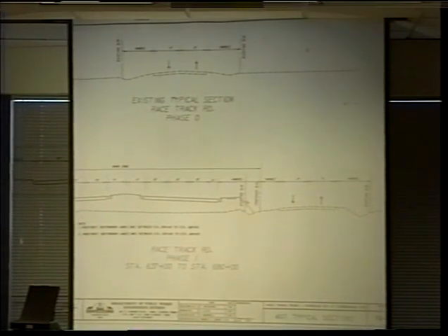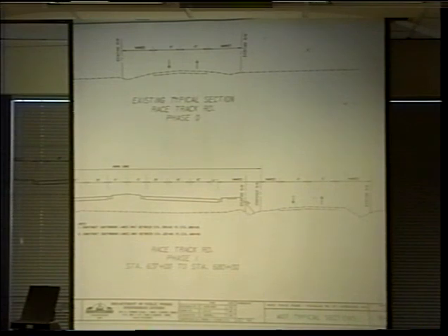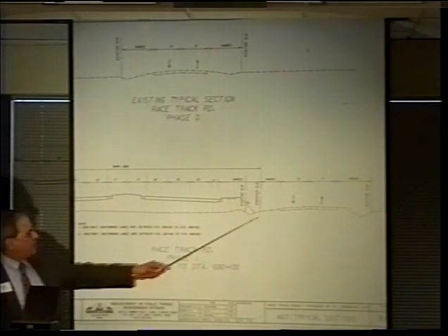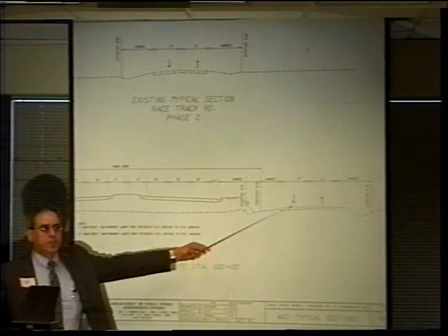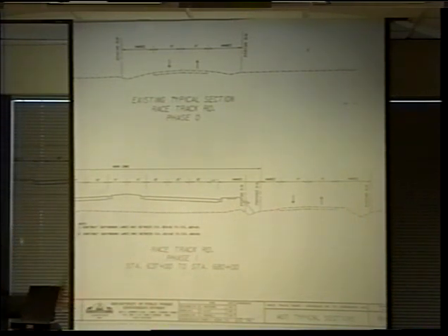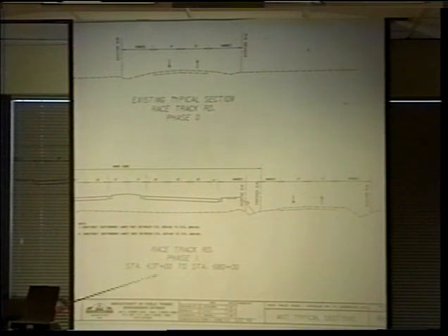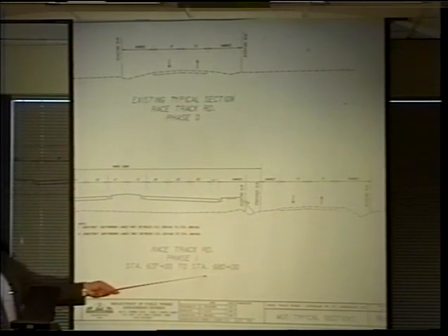Finally, another condition here where the MOT, maintenance of traffic typical sections, are being provided to you. This looks like the existing road, which will be maintained in service. It's going to be used throughout the construction of this road. So the new roadway construction is going to take place alongside the existing road, at least for this particular phase and for this length of the project.